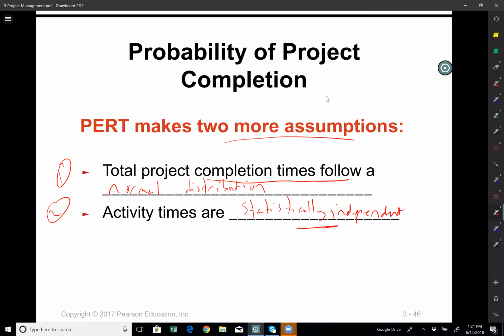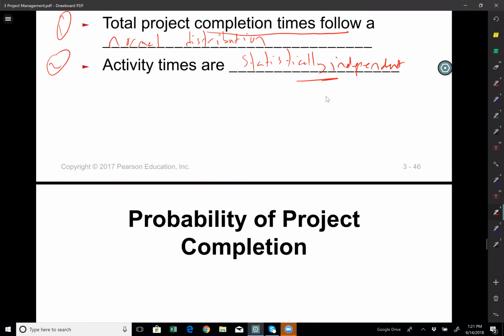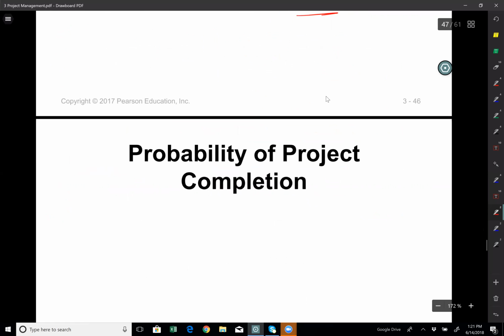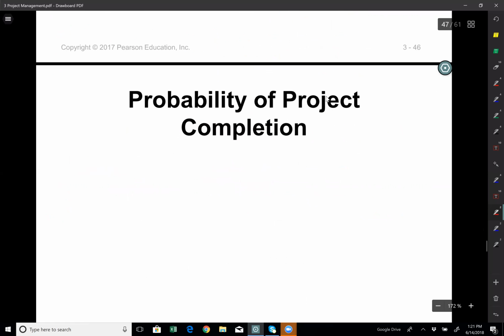which is based on other activities before, can change that duration. Because let's say I have an employee who's sick or injured, doing the same employee another activity, then if my activity C, let's say, is delayed, the dependent activity D, which is done by the same employee, most likely will be delayed as well, right? So there's some kind of dependency normally, but we assume that there is none.